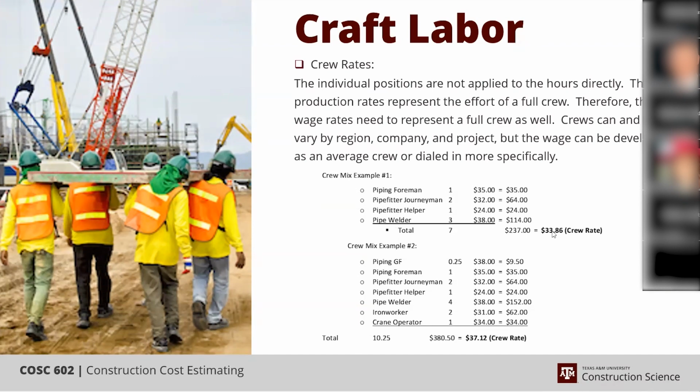The other thing, and I don't mean to confuse things, but I'm just stating the facts: some companies like their direct cost to be base comp only. It only has the W-2 and the overtime premium, and that's about it.